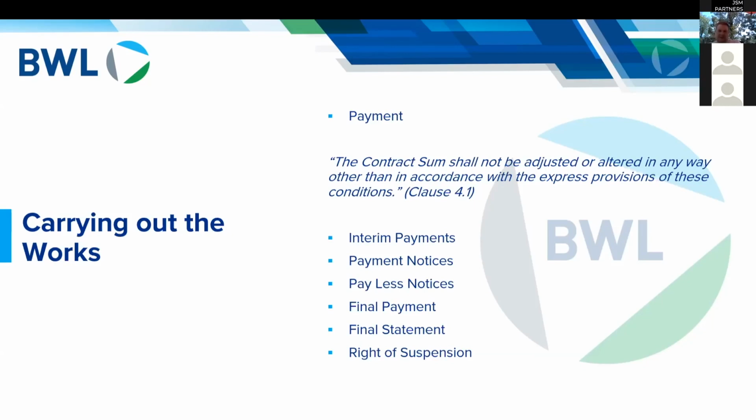And that's reasonably unique to JCT, because other standard forms of contract don't allow that process. Other forms of contract, for example, NEC3 contracts, they don't have a concept of final account. Everything's treated as a monthly interim application.